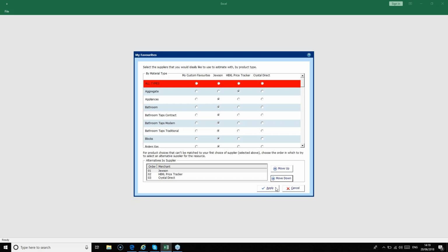We're quite often astounded because builders sometimes don't know how much profit they're going to make. If you don't know how much profit you're going to make on a job, how can you know what percentage you can afford to be negotiated down by before you're actually making a loss? So you really need that information at the outset of a job. Obviously, having that good base set of data will also help you have a forward view of your company's cash flow, and it can help you to monitor costs during the build and help you to spot cost overruns quickly.